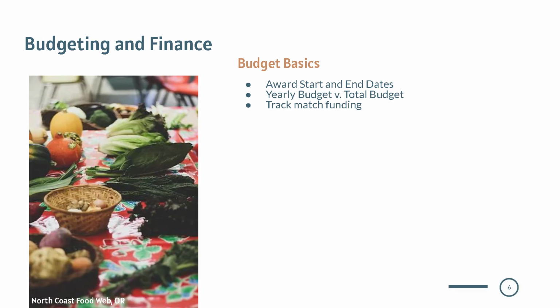Your grant award includes an approved budget, which you'll find in your grant agreement. If your grant spans multiple years, you may have been asked to break down your budget by year in your proposal. One key thing to note, the amount listed for each budget category in your agreement represents the total for the entire performance period of the grant. This is the most important figure to focus on. The actual amount you spend year by year may vary, but the total budget for each category over the entire grant period is the baseline you'll work with.